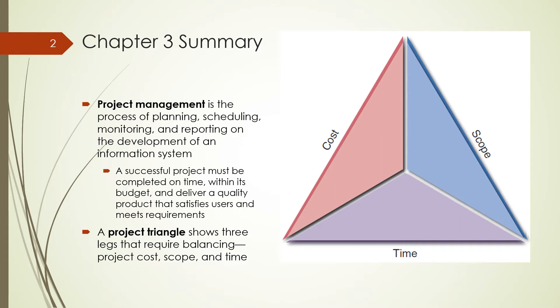A project triangle shows three legs that require balancing: project cost, scope, and time. If you change any one of these, it'll impact the other two. For example, if you increase the scope of a project, most likely it will increase the cost of the project and also increase the time it takes the project to be completed.